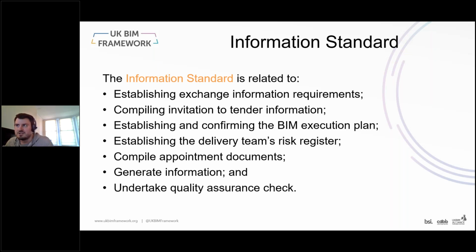And finally, it is used as part of the quality assurance check, meaning that for any information to leave the work in progress part of the common data environment process, it will need to have referenced the information standard, and someone will have undertaken the review of that to ensure that when anything appears as shared and is available to other teams, it should already be conforming to the information standard itself.